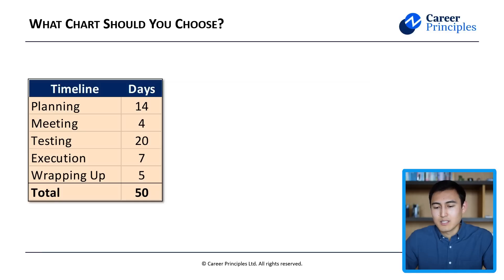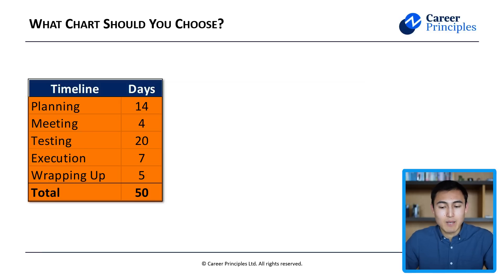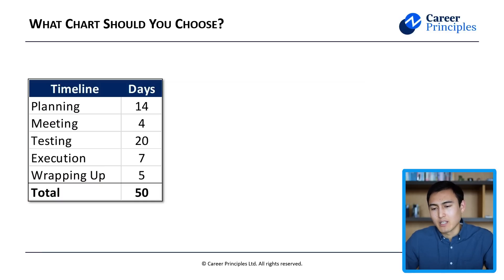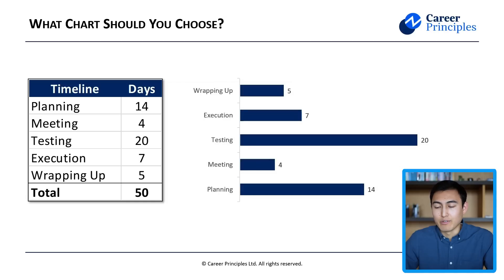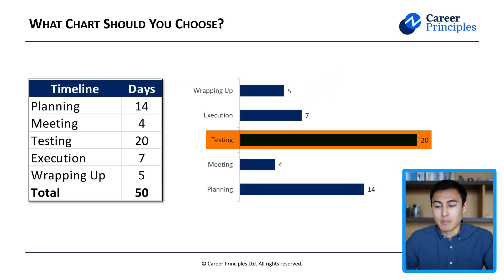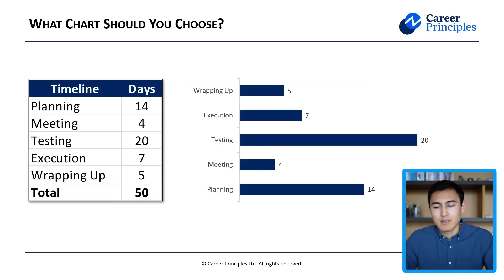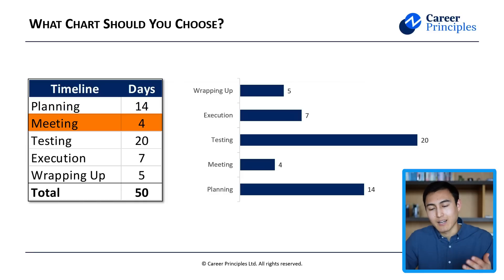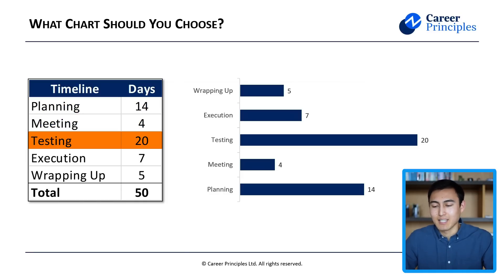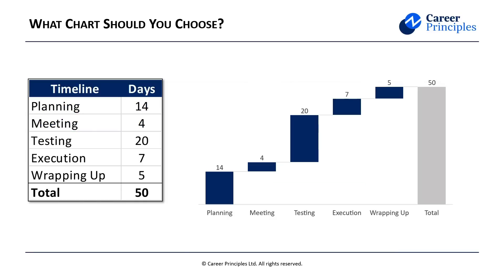Let's take a look at another example with a different table. We have a timeline of days for some kind of project. You might think of using a bar chart — it does show that testing is the biggest phase, which is quite positive. That said, it's not something that's cumulative, and it should be in this case: after 14 days we unlock the meeting phase, then the testing, and so forth. So instead, maybe a waterfall chart makes more sense.